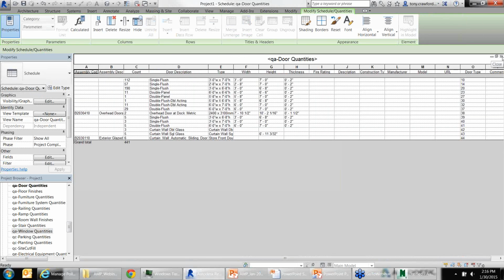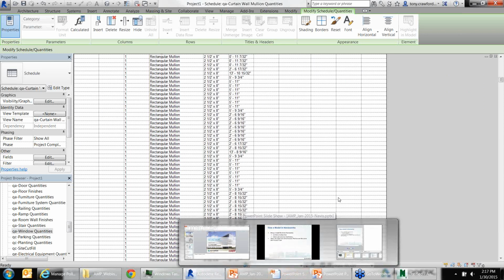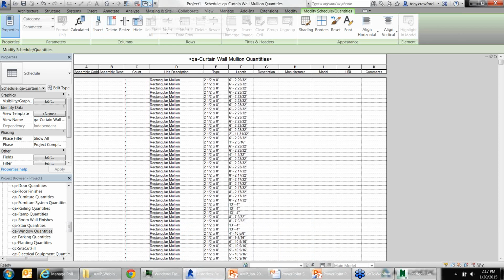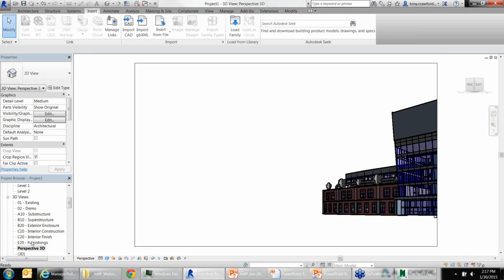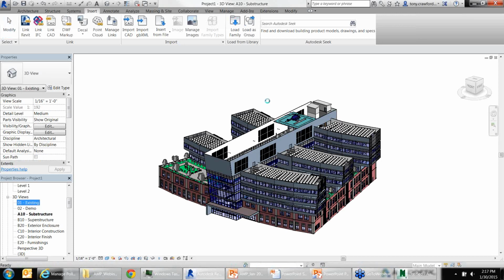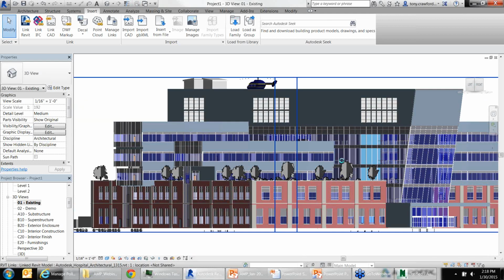And you can add costs into this, and like I said earlier, this can also be tied into things like, not Primavera, but Timberline and other estimating programs, other 4D programs. For example, you have a catalog of materials. One of the examples that we like to use is that you have a window, but then you've got to have caulking and whatever else you need to put the window into the wall, but you don't really want to model all that. You just want to know that when you have a particular type of window, it's got to have all this stuff with it, and that has a cost. You can create this catalog of assemblies that has all of that material and the costs involved. So when you're estimating windows, the window costs this much, but the actual installation and materials cost this much additional. Things like that you can do, but it takes a while to set up.